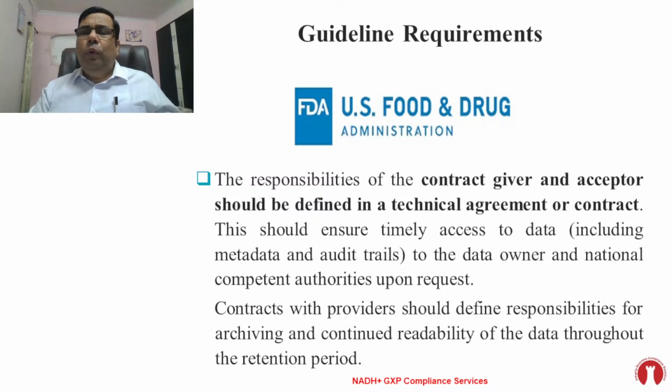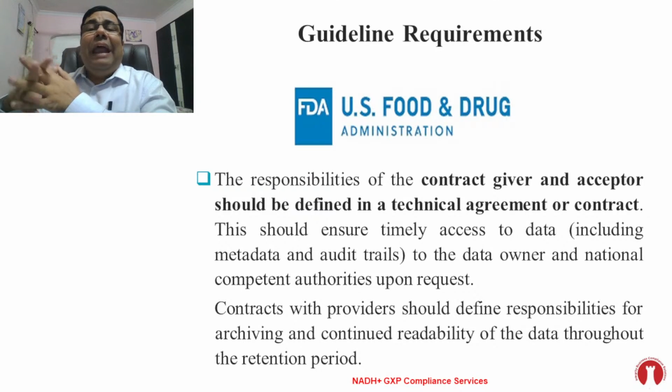The next point I would discuss here is that the responsibilities of the contract giver and acceptor should be defined in a technical agreement or contract. So whenever you are dealing with a computerized system, you need to have a technical agreement. This should ensure timely access to data. Of course, when we are discussing data, you need to consider the metadata and audit trails, available to the data owner and national competent authorities upon request.